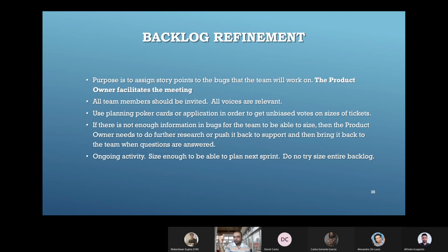So one example: okay, this is one specific story, but we don't want this immediately. This is needed for one of the customers who is having time in their implementation, and the integration will happen after 3 weeks. So if we take it in the next-to-next sprint, that should be fine. So he may put it into that sprint 17 bucket, something like that.